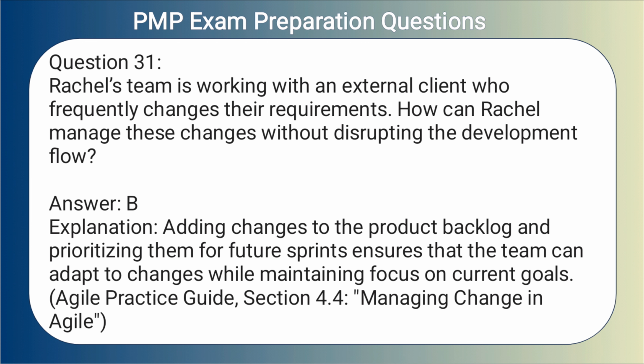Answer. B. Explanation. Adding changes to the product backlog and prioritizing them for future sprints ensures that the team can adapt to changes while maintaining focus on current goals.